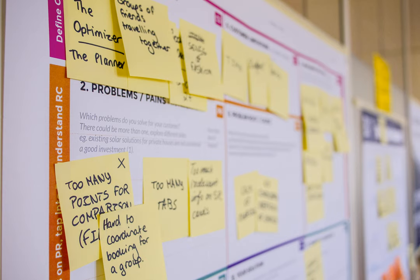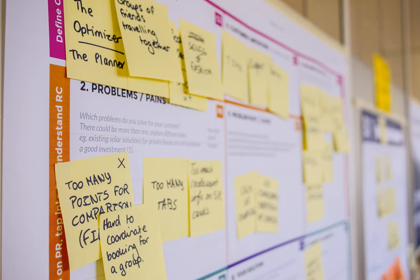Sprint reviews are not accountability or process improvement sessions. The sprint review is the place to review the work increment. While this can include identifying work not done, it's not the place to problem solve for that. The sprint review is a reasonable place to discuss problems that were solved or potential new work that was identified, but it's not the right place to discuss organizational or process impediments.